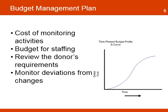The plan will include information on how to manage and make changes to the budget and the approach to monitor closely any deviations from the plan. The project manager can use a simple S-curve diagram that plots the information of the project cost over time and uses it as a baseline to track actual budget performance.